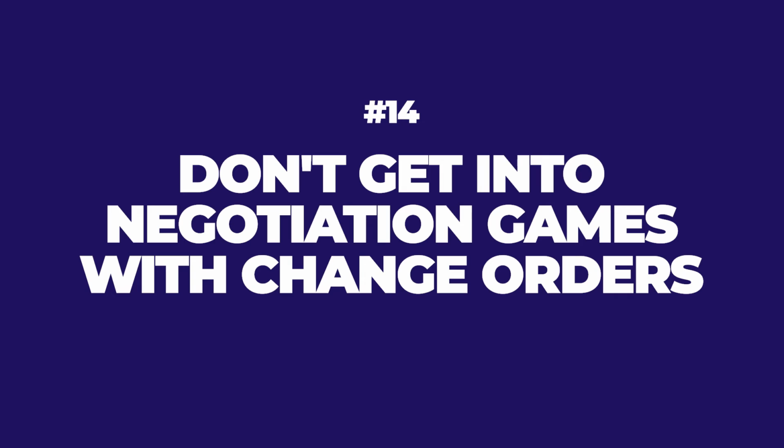And number 14, don't get into negotiation games with change orders. Your trade partners are doing your change order at a fair price to you as a favor. They're not making any money off of this. So don't go nickel and diming them and really whittle down those prices and beat them over the head and threaten them with not approving their pay applications because of change orders. Be kind, negotiate a rate or a price before you do the work, and manage it properly.